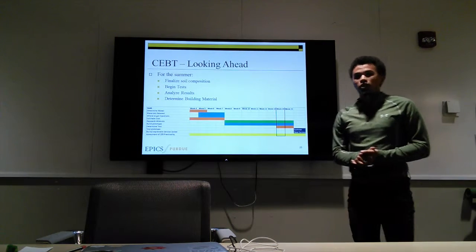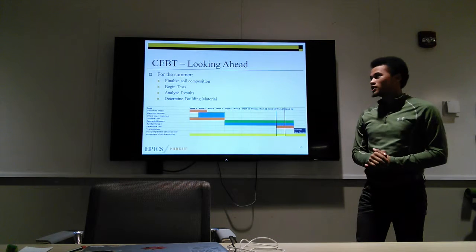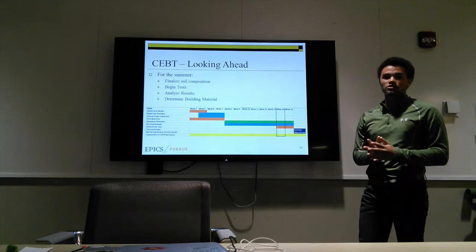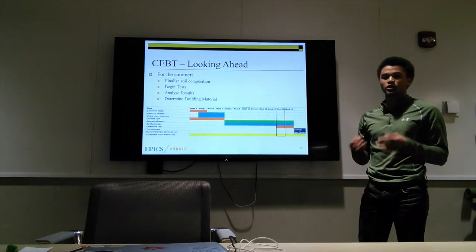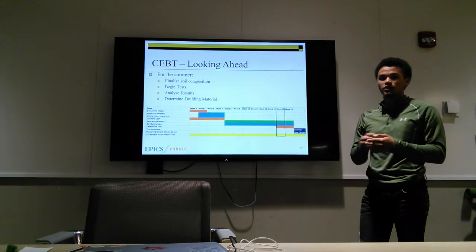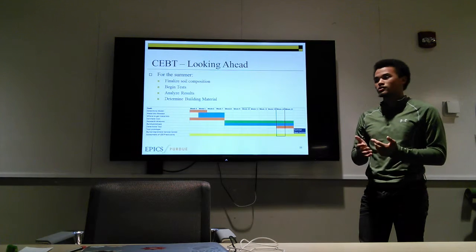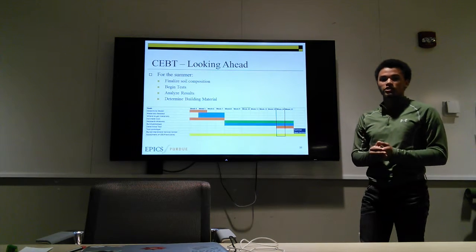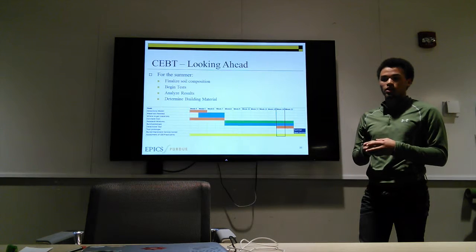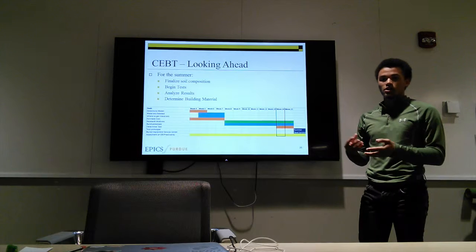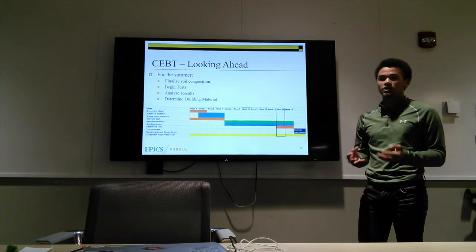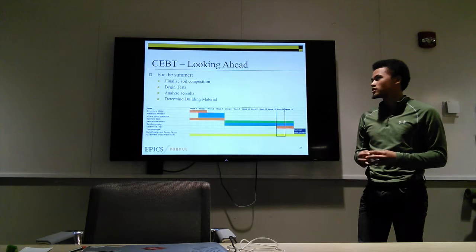While we have made a lot of progress, there are still a few things that we need to do this summer. First of all, we need to finalize the soil composition. We are working with a technical school in Lubisi to conduct a soil analysis, so that while we're conducting our tests, we will have the same soil that we will be using in our final project, so that we don't have any unforeseen errors that could occur based on the differing soil composition.